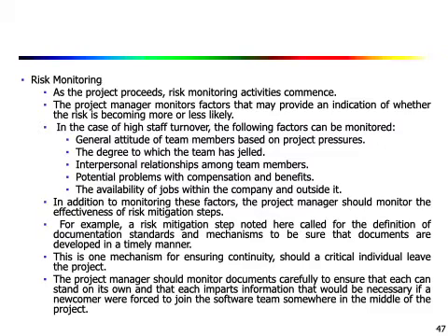In the case of high staff turnover, the one we have seen just before, the following factors can be monitored: the general attitude of team members based on project pressure, the degree to which the team has gelled, interpersonal relationships among team members, potential problems with compensation and benefits, and availability of jobs within the company and outside it. So these are the things that we can monitor for that risk.